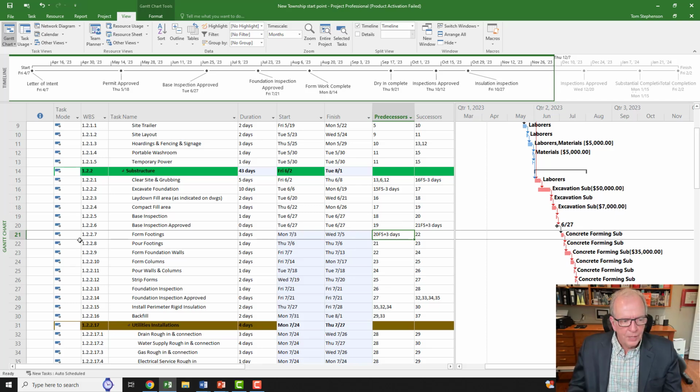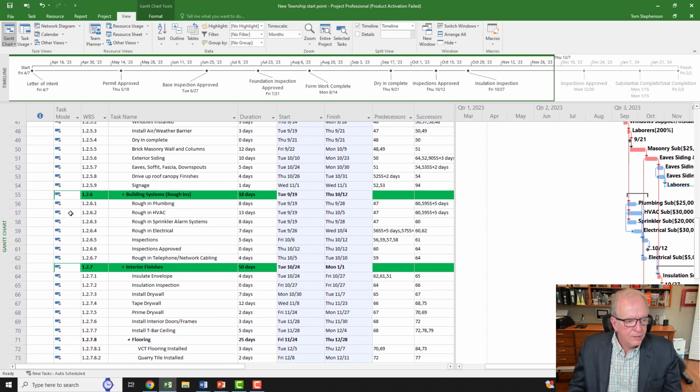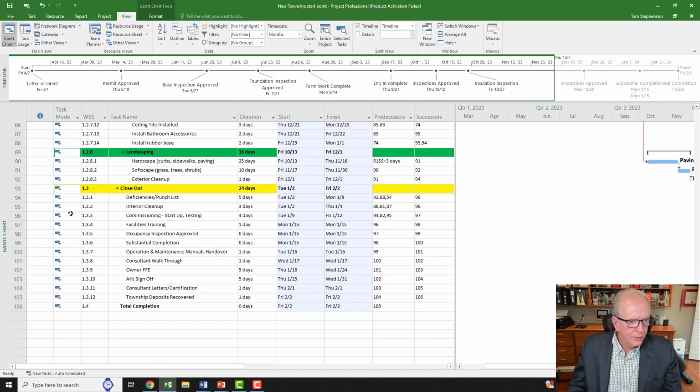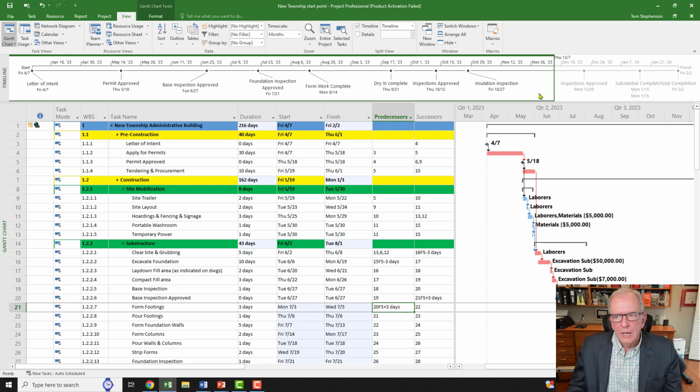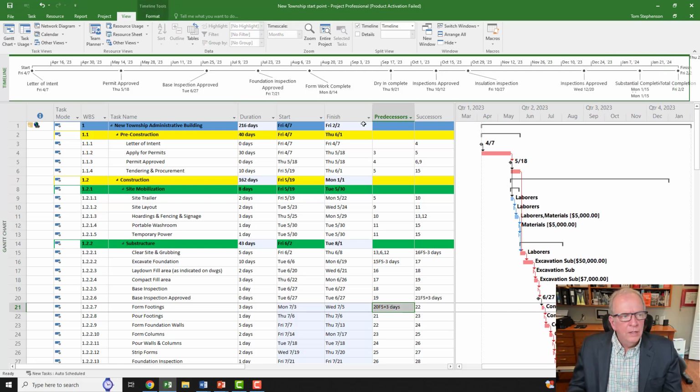So that's helpful, and I'm rid of my constraint, and I'm not seeing any more constraints all the way down, so that's good. I'm also going to check along the top here. These are my milestones. I put milestones along the top just so I could visually see them if they're distributed. Like I might decide, okay, from towards the end of October to the middle of December, maybe that's too long. I should look in my schedule. Is there something suitable for a milestone over here? I could do that if I wanted to.